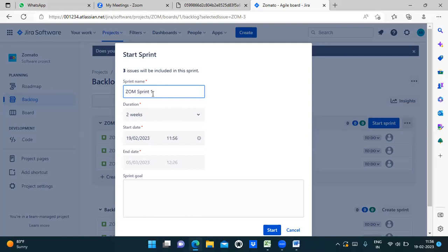You can also rename your sprint if you want to, guys, or else you can just leave it like that. Here we also decide the start date when the sprint has to start and when it has to finish. You will decide all of this in the sprint planning meeting, and set it according to that in Jira. Exactly, how many user stories will be decided by the Scrum team only in the planning meeting.